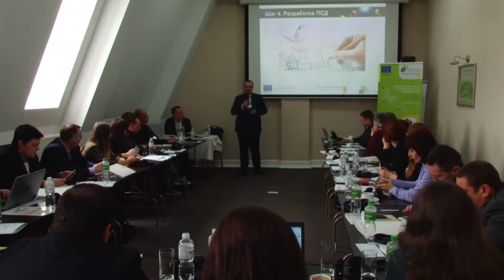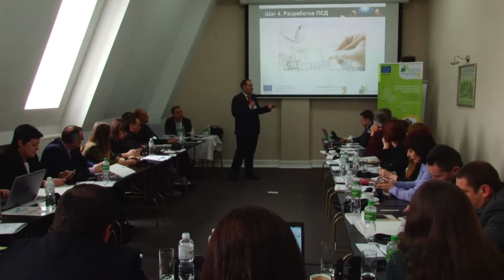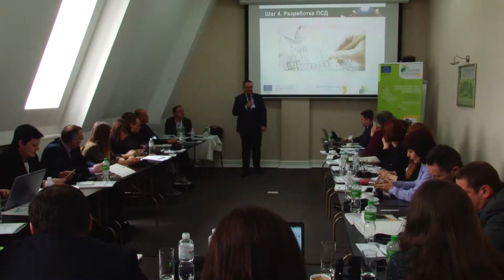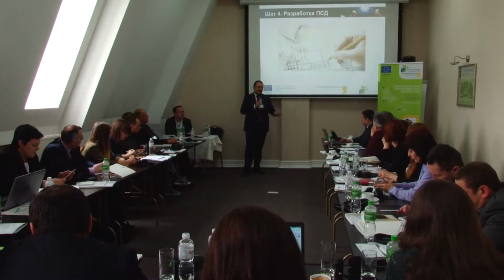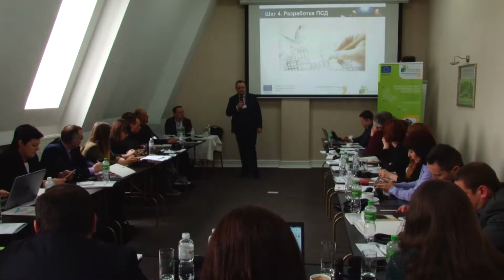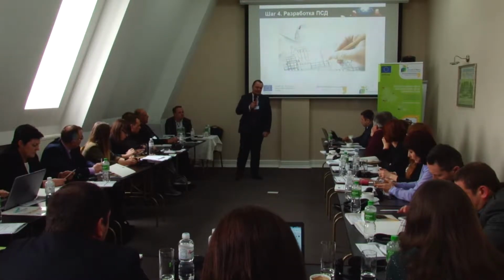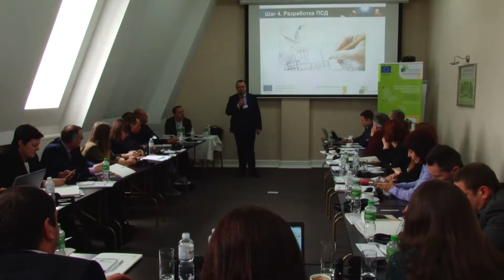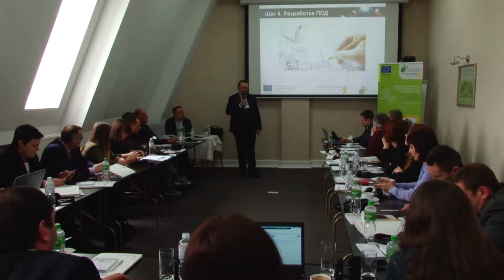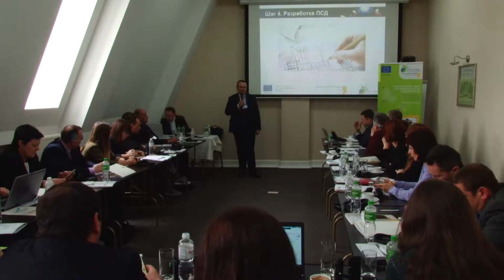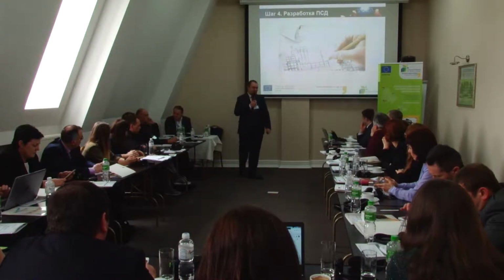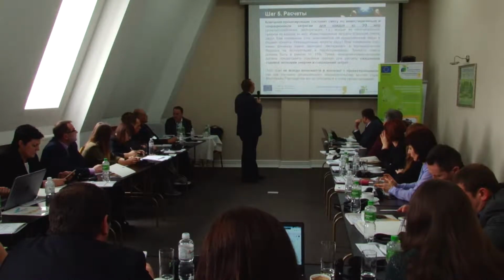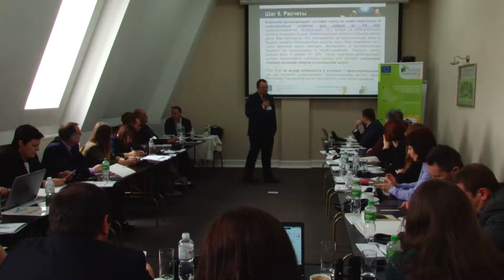In the first phase, we had some projects that were trying to deal only with bills of quantities, with no graphic part, just calculations, only bill of quantities. But I think that this option for the demonstration project won't go. That's why we are insistently recommending you still to develop the graphic part for all projects.